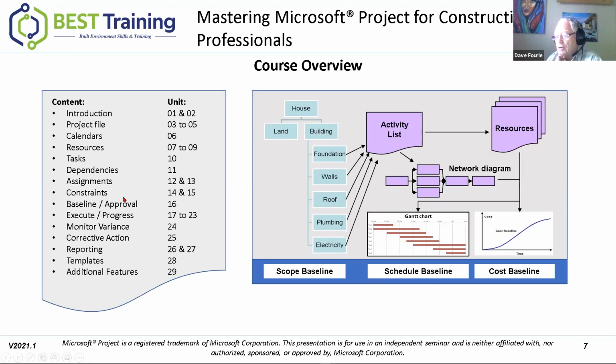Then we're also going to look at constraints and the type of constraints that we got in Microsoft Project. We could have different date constraints. We're going to see those constraints. We know that on a project there are numerous constraints. Normally we are constrained by the time available, by the people available, the cost, and all of that. So all of those constraints is part and parcel of how we set up the whole of Microsoft Project. But in Microsoft Project, you can also bring additional constraints in. Date constraints. This task can only start on this day, or must start after this day, or must start before this day. So you can bring all of those additional date constraints in also.